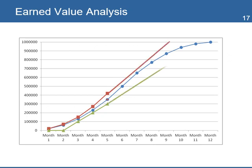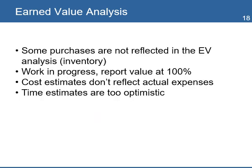With this information, you know that if you continue the project with the same trends in CPI and SPI, you will run out of money on month 9 and will not be able to complete all the health centers. You need to analyze and investigate the probable causes for these variations. Some purchases are not reflected in the EV analysis — actual costs can be higher because of inventory of material purchased that has not been used in the construction of the centers.